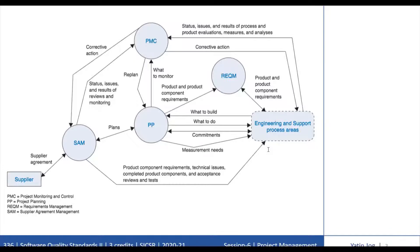The requirements management process area is fundamental to a controlled and disciplined engineering process. The Supplier Agreement Management process area, SAM, addresses the need of the project to acquire those portions of work produced by suppliers, outsiders, or third parties. Sources of products that can satisfy project requirements are proactively identified, the supplier is selected, and a supplier agreement is established to manage the supplier. The supplier's progress and performance are tracked as specified in the supplier agreement, which is revised on a timely basis. Acceptance reviews and tests are conducted on the supplier-produced product components.